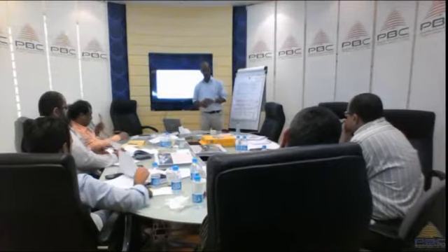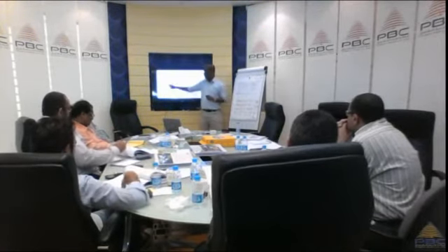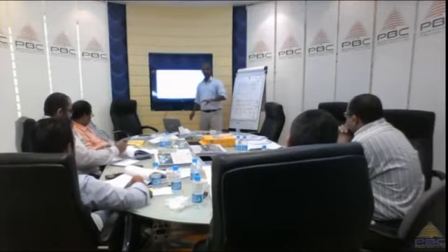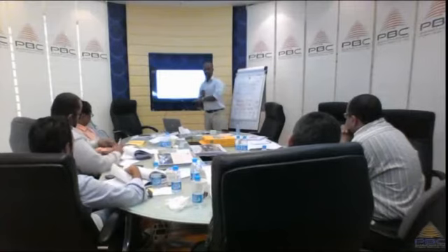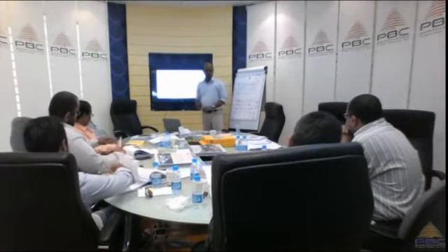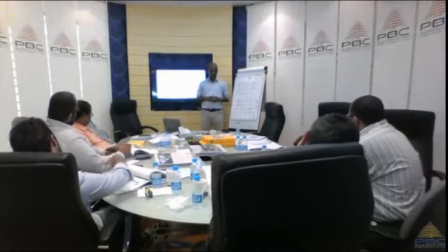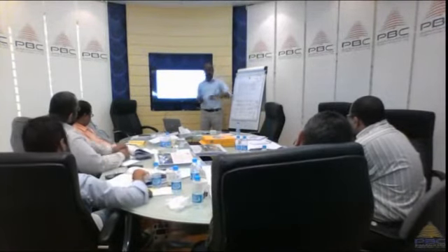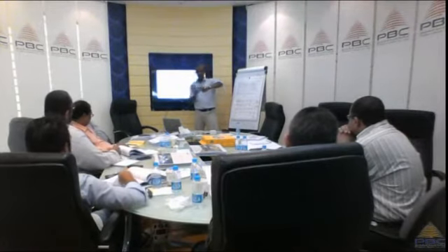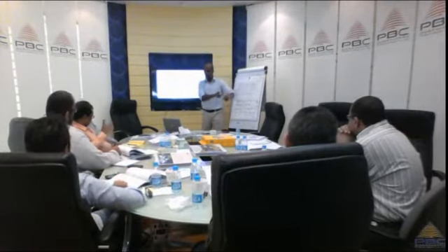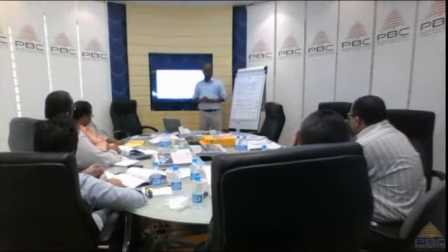The first one is to tell the project manager, listen, all what you have done in terms of your planning is useless, we will calculate a new EAC. So we scrap everything. Now, how do we calculate a new EAC? By adding the AC, actual cost, and a new estimate to completion. And we add the two. So it's like we're starting a new, fresh project.